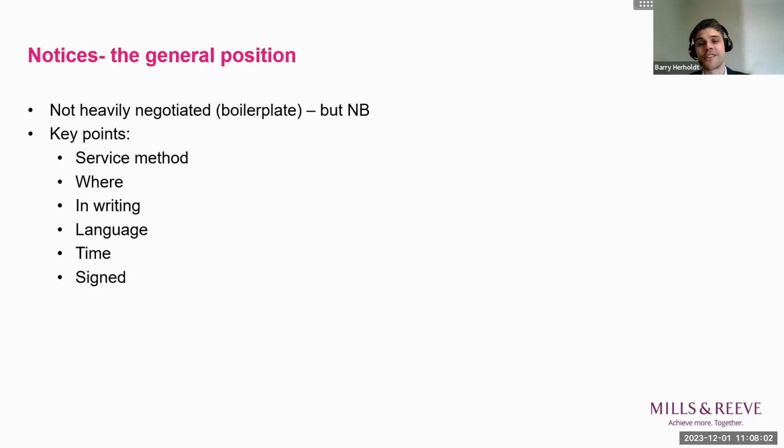The next point to consider is, should the notice be in writing? Because of the various challenges that can potentially arise if you wish to prove an oral notice, it should normally be mandatory for the notice to be in writing. A point worth mentioning is, for most purposes, English law already regards emails as writing, unless otherwise agreed under the contract. Another point is the language. This is an obvious one. Choose the language that parties will be able to read and understand.